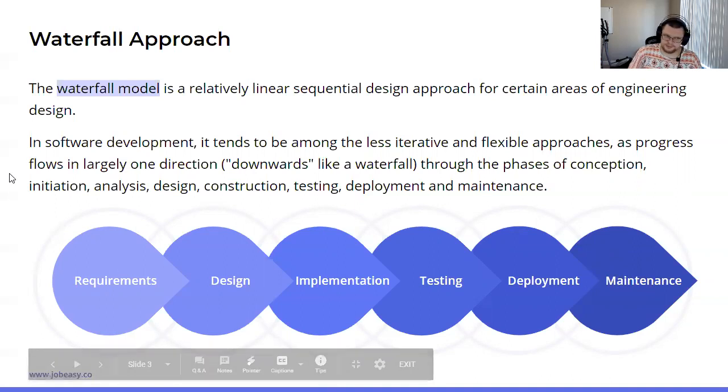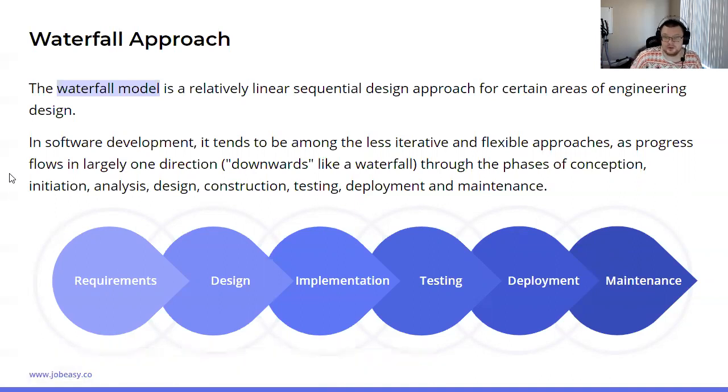Waterfall projects are a year, maybe a couple of years, sometimes more, but they have a lot of documentation beforehand. Everything is developed in huge chunks that take quite some time, maybe 2-3 months. So first everybody works on the requirements. It doesn't really stop when you're done, but the biggest part of it is completed. Then the design part takes place, so everything is thought through: how it's going to work, where it's going to end, how much resources are needed, the dates are set, and there's a plan that the team is following for the whole product, for the whole set of features.